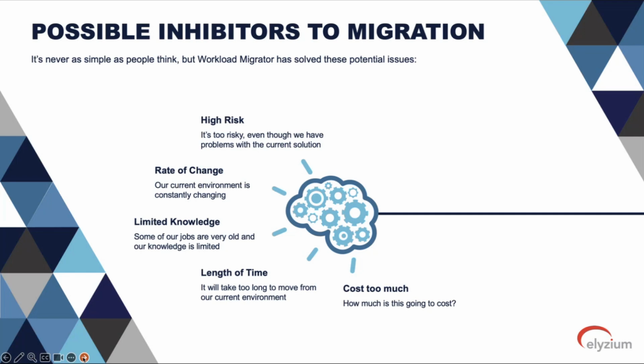Well, the way you do it is by using an ETL tool, because you're extracting, translating, and loading. So as it changes within your source environment, you extract, translate, and load into the target environment, IWS. And that all becomes part of your functional testing plan, so that you make sure that what you're testing is like for like within a particular data block.